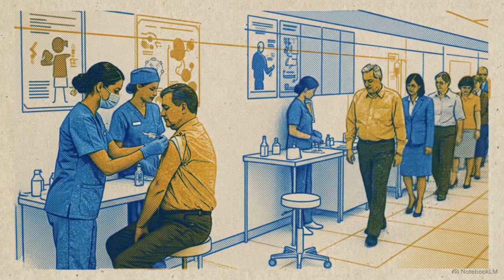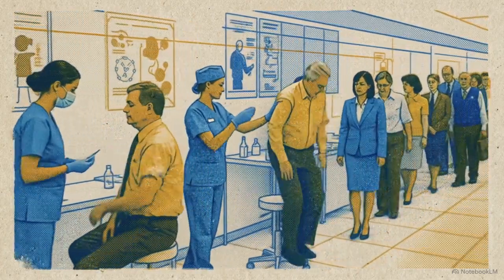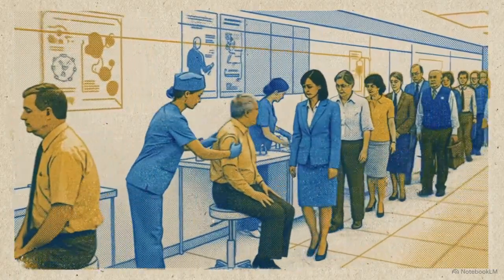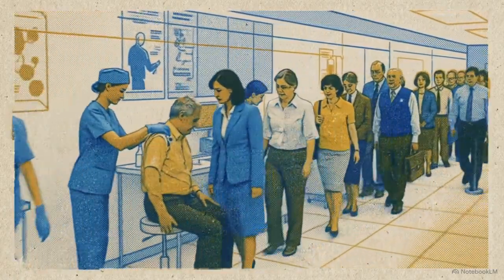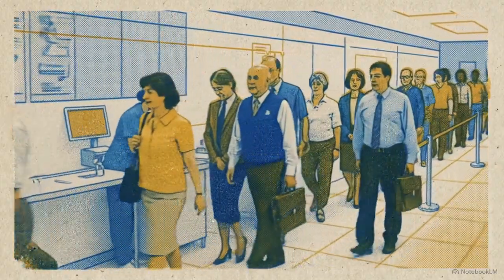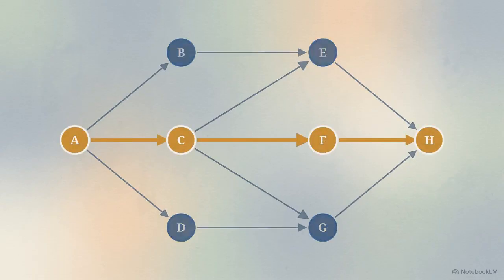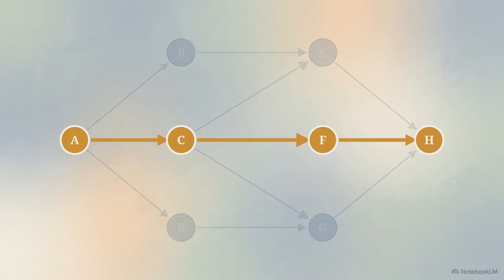By contrast, routine medical logistics, like an annual flu campaign, do not have uncertain timelines. For well-defined, deterministic projects, administrators use the critical path method, or CPM. This network map displays the critical path, the absolute longest continuous time path moving through a project. It presents a paradox. This longest sequential chain dictates the absolute shortest possible project duration. Delay one step, and the entire campaign fails.